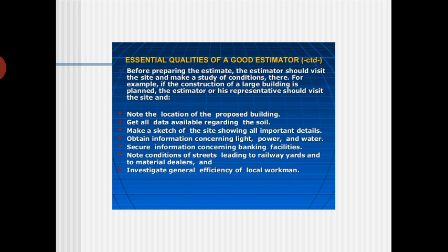If they are not coming to the site regularly and not constructing, then day by day the cost of the building will increase. When you start estimating the building today, if they are going to complete it in the next 5 or 6 years, the cost of the building you estimated will keep overrunning and will be more at the end.